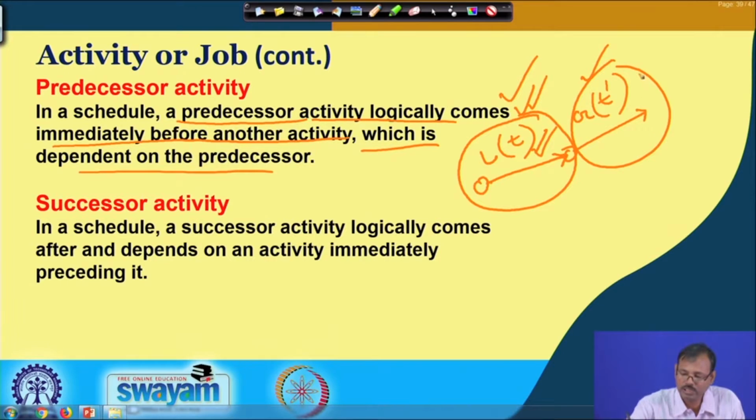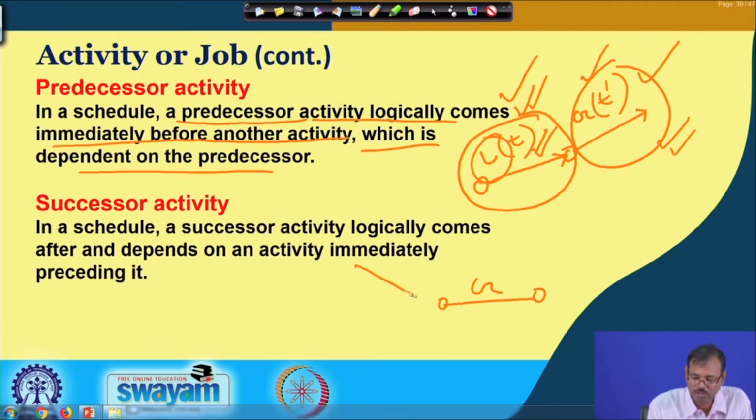Similarly, this is the successor activity of that activity, because only after the completion of the lead does the next activity start. The lead goes into that unit operation to start that operation. So, this is the successor activity. It may be possible that there is more than one predecessor activity. If you consider the grooving of the pencil, you will find the lead must be manufactured beforehand.